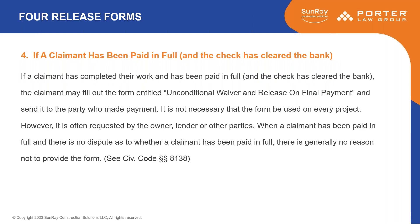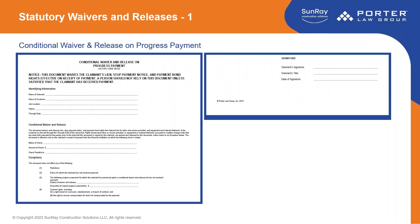The final form is if you have been paid in full and the check has cleared the bank — then you're going to want to use an 'Unconditional Waiver and Release on Final Payment.' Whether the other party chooses to use these is up to them; I wouldn't rush to do it unless you're asked. And then we're going to go over the forms — that's Civil Code section 8138.